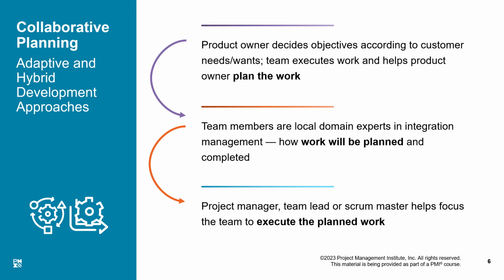restriction, right? And once we deliver those items, then we move back to the product backlog and see what new requirements have been added there. We prioritize everything. And again, once they are in order of priority, the team selects another couple of items for the next iteration. So that way, iteration by iteration, we keep performing until all the requirements of the project are completed. So we probably cannot say how much time this project is going to take. It may take forever to complete, or it may finish early. This all depends on the changing nature of the requirements. When the customer says, all is well, I don't need any more things to be done, the project can be closed after that, right? I hope I'm not confusing you too much.